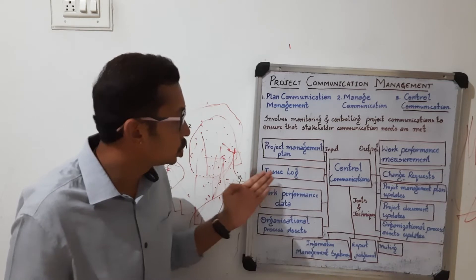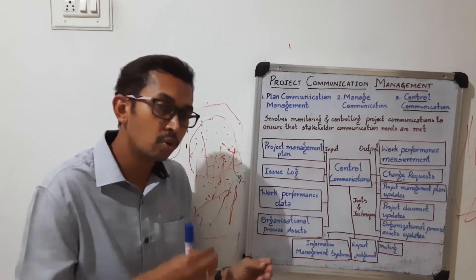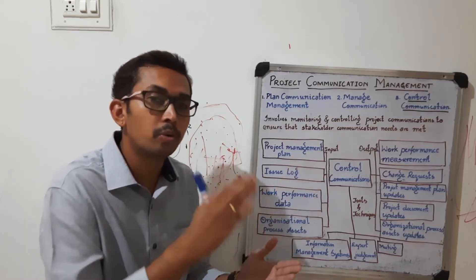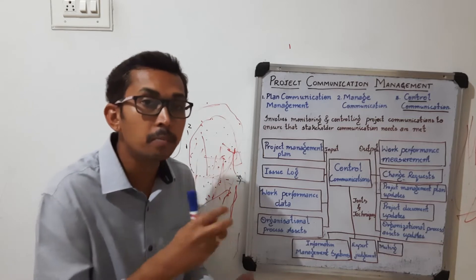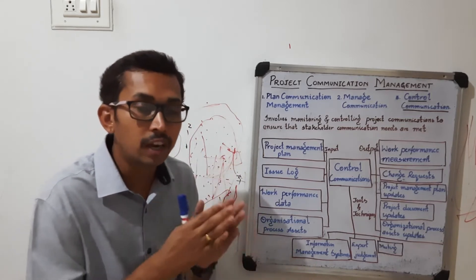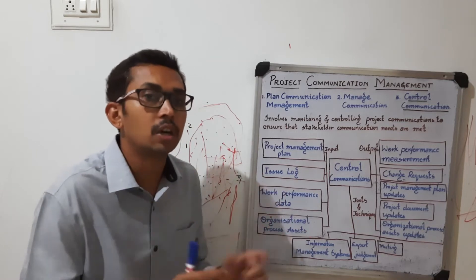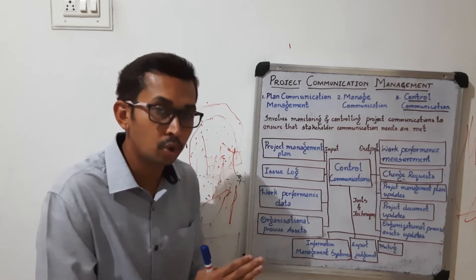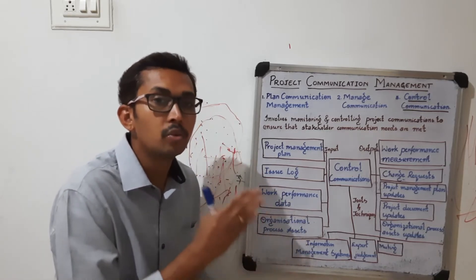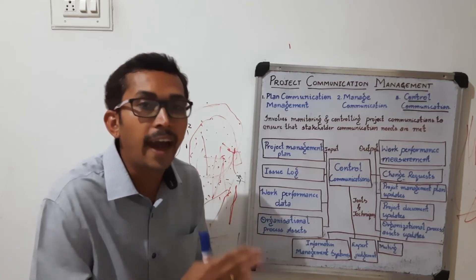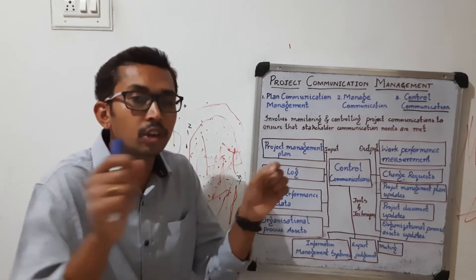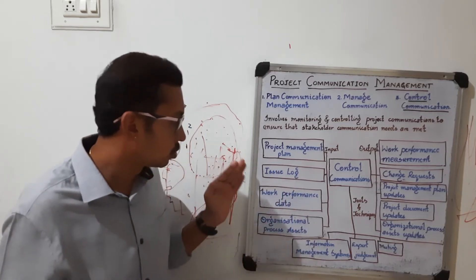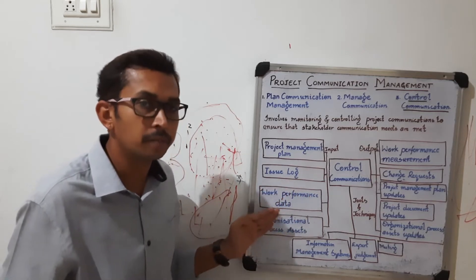The next input is the issue log. When you start and execute a project, many problems or issues arise. These are documented in a register or spreadsheet, along with the solution or action plan being taken. That is what we call the issue log.